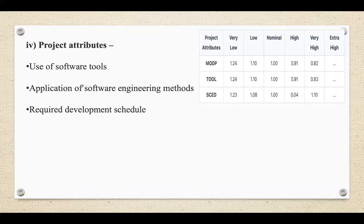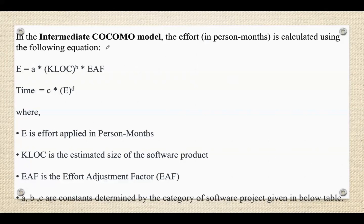The last set of attributes are project attributes, including: use of software tools such as CASE tools; application of software engineering methods; and required development schedule — the urgency of the project timeline. In the Intermediate COCOMO model, effort in person-months is calculated using the same base formula as Basic COCOMO, multiplied by the Effort Adjustment Factor (EAF): Effort = A × KLOC^B × EAF. The development time formula remains the same: Time = C × Effort^D.